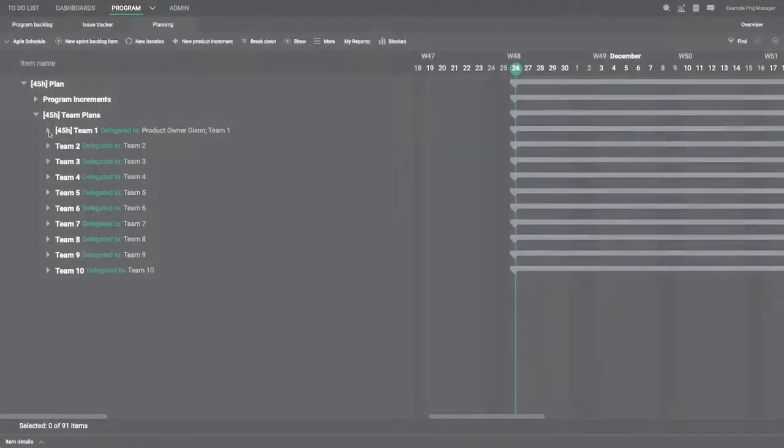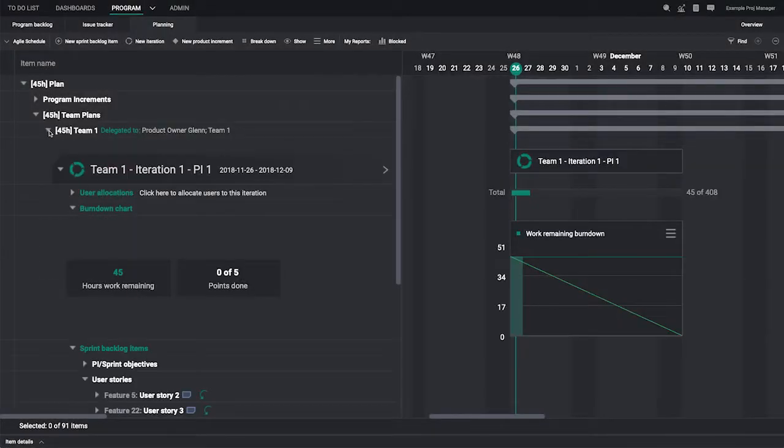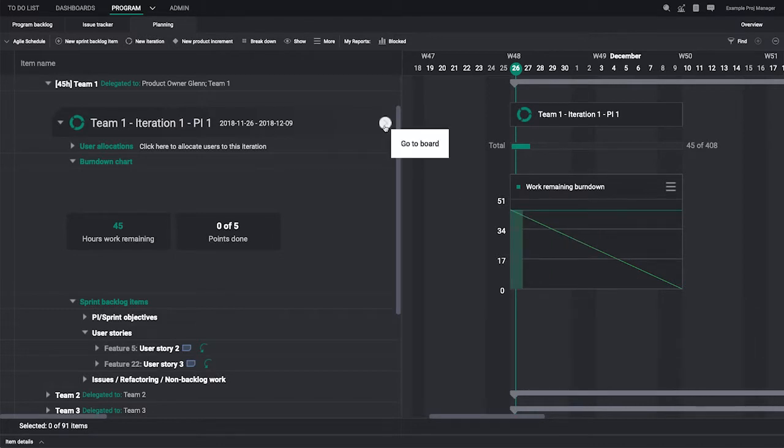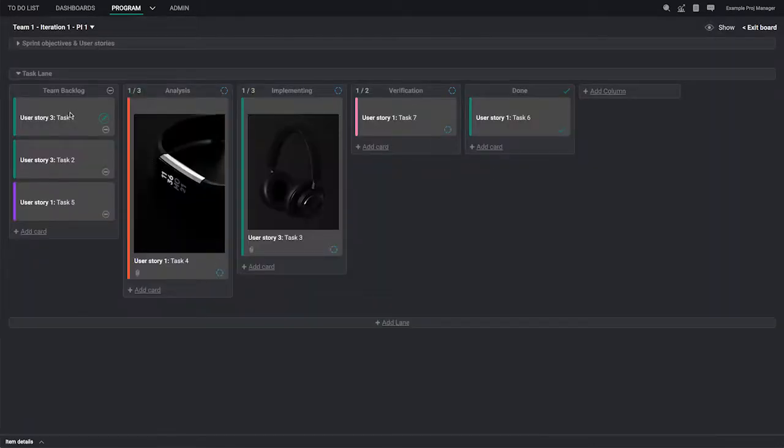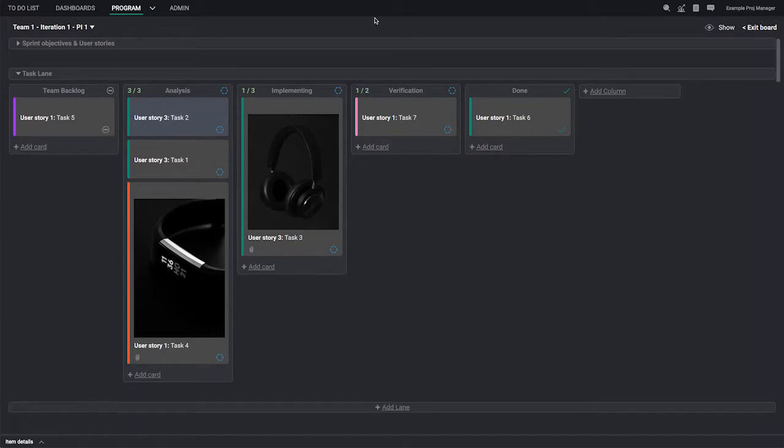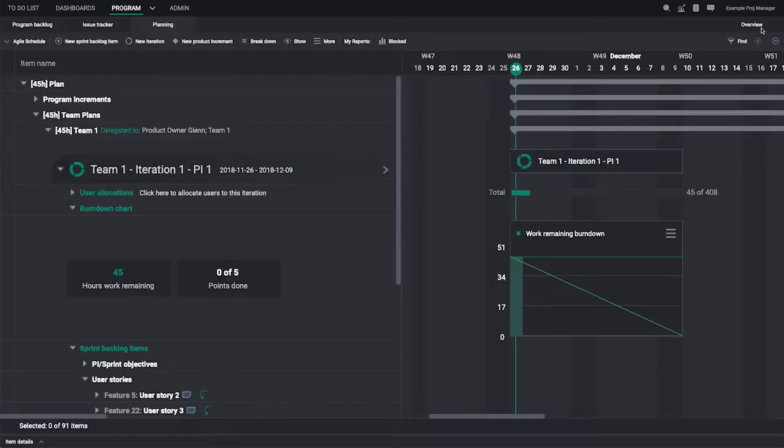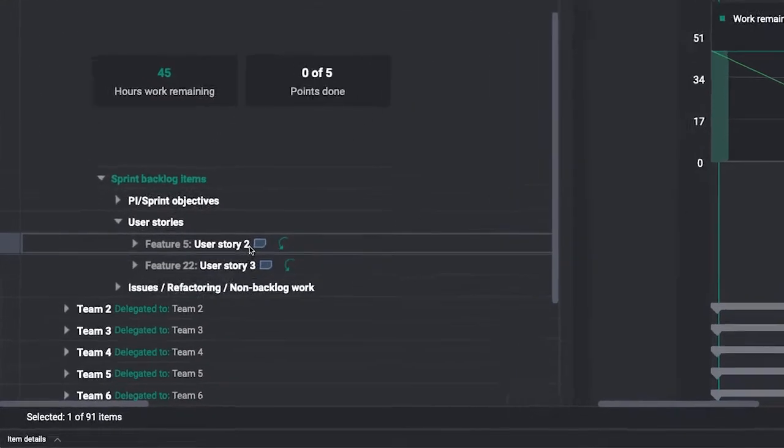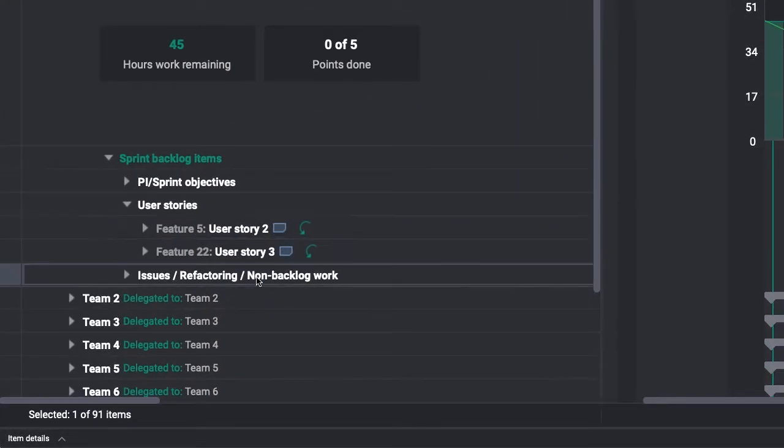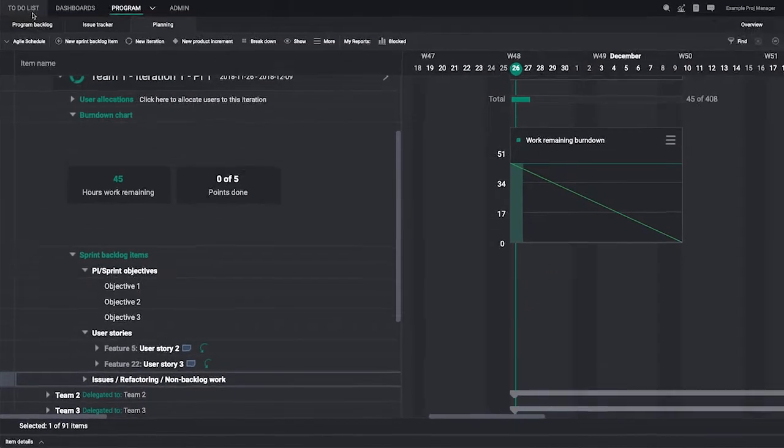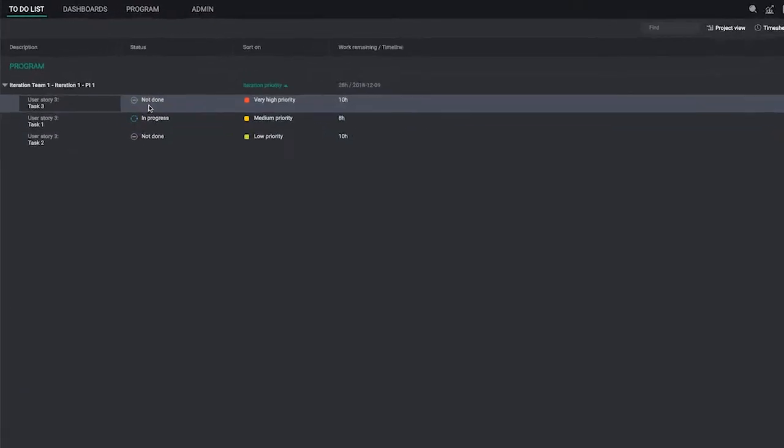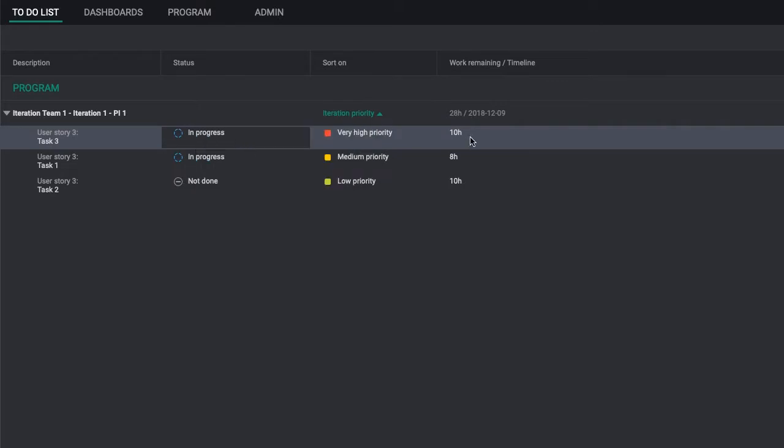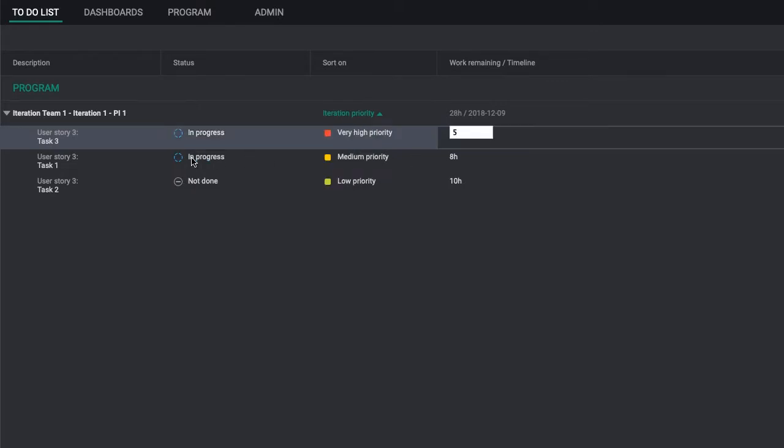With HanSoft, SAFe teams synchronize and deliver on cadence, all in one view. And they do it productively by working their own way. Some use scrum. Others use Kanban. Each team can break down their own sprint backlog in HanSoft to the level of detail they need. Team members use the to-do list, sorted by priority, to update progress on a daily basis.